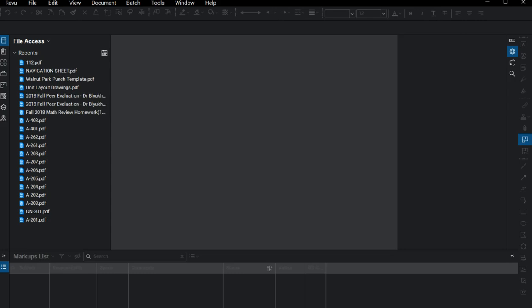complete the repair. As technology has advanced over the past few years, that process has, in a way, gone online or gone digital, in such a way that we can not only create the punch list itself, but also track the status of that completion list, and also manipulate that data to, for instance, produce a spreadsheet with just one subcontractor's issues, rather than an entire notepad worth of notes, and then subcontractors having to go through and individually read each note to determine if the things pertain to them.